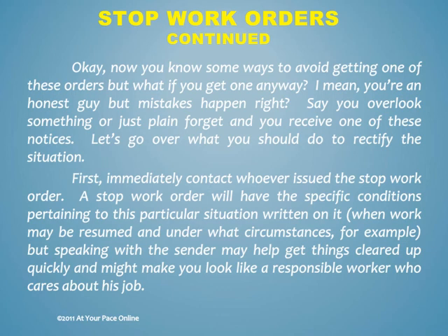First, immediately contact whoever issued the stop work order. A stop work order will have the specific conditions pertaining to this particular situation written on it. When work may be resumed and under what circumstances, for example. But speaking with the sender may help get things cleared up quickly and might make you look like a responsible worker who cares about his job.